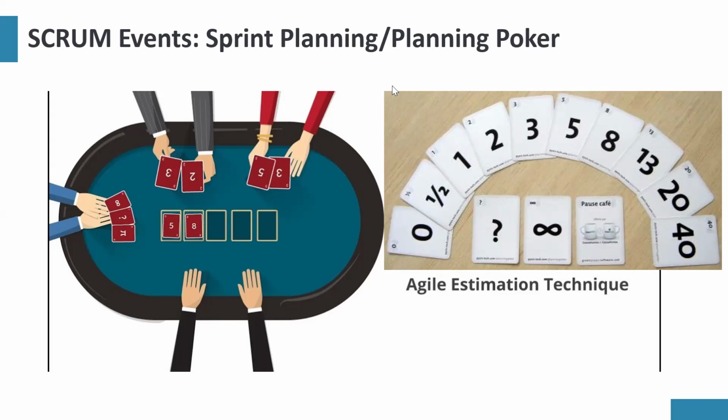So in Scrum, the effort is not time related because they don't want to be put under pressure. How we use it is, if 1 megawatt of power is 1 story point, 2 megawatts is 2 story points, 3 megawatts is 3 story points. For any work in between, we can now compare: is this work related? Is it like the work done for 2 megawatts? Any work afterwards that we're going to estimate, we compare it to the base that we've done.